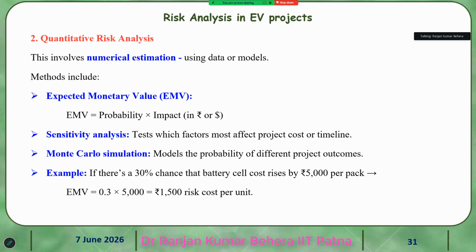Sensitivity analysis tests which factor most affects project cost or timeline. And Monte Carlo simulation gives the probability distribution of project outcomes.